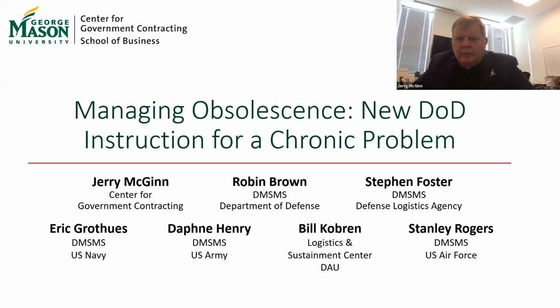This is from Kevin Hennebury. He breaks DMSMS into two parts, managing obsolescence and fixing obsolescence. So that's sort of identifying and mitigating the obsolescence issues. Specifically, when bidding on a 5-year production RFP, for instance, where DMSMS is considered in scope and needs to be included in the bid price, is it appropriate to have both parts in scope or just part one? Including part two, that is fixing obsolescence, can introduce unnecessary inflated proposal prices due to trying to price the unknown. Any thoughts on that?